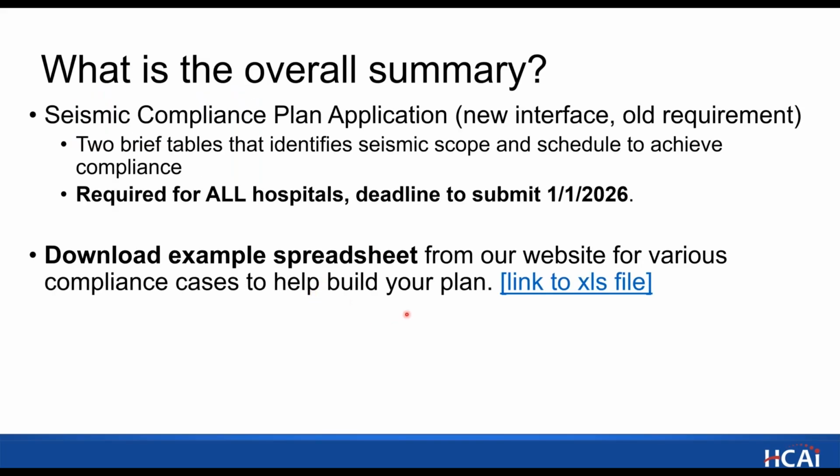On every webinar, we try to give an overall summary in the beginning. So here it is for this one. Two points. One is the seismic compliance plan is required for all hospitals. The deadline to submit is at the end of this year. For all general acute care hospitals, the code requires submitting one.